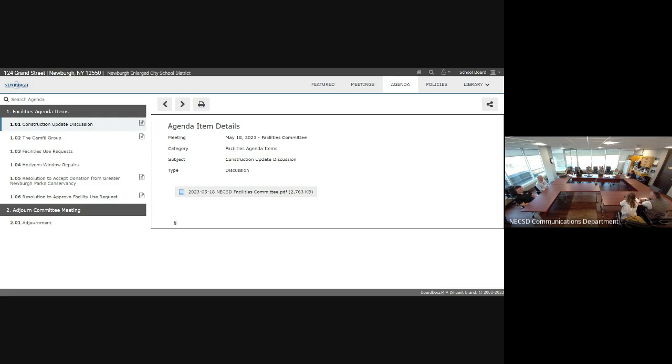And anticipating the contract award, which we don't know the Board of Ed meeting yet, but we're anticipating it at the end of July to award. Now, that has the potential to shift based on when we receive all the information back. I believe the general conditions of your contract language is with the attorney right now, so that would be something that needs to be incorporated prior to going out. So I think we said if we release for bid between May 22nd and June 12th, we were well within the window to be able to maintain the schedule.